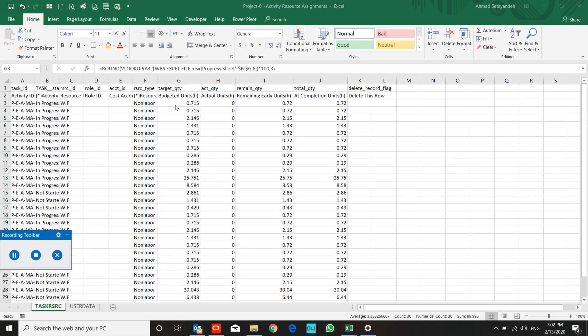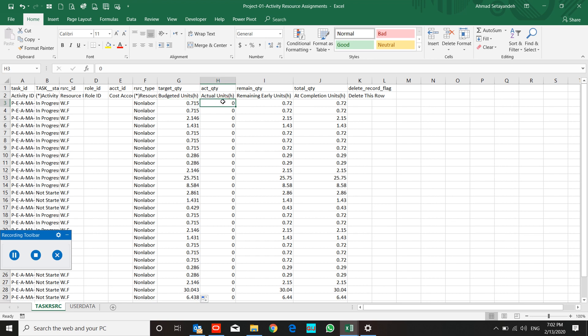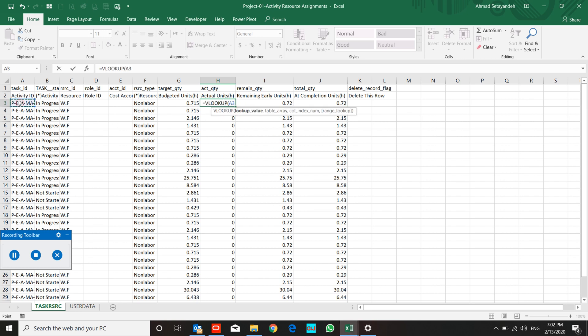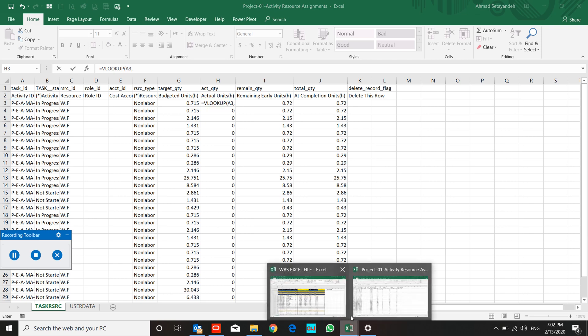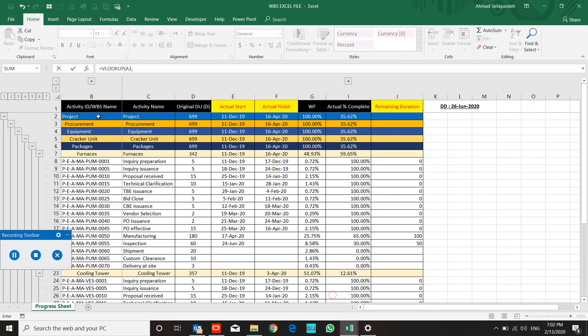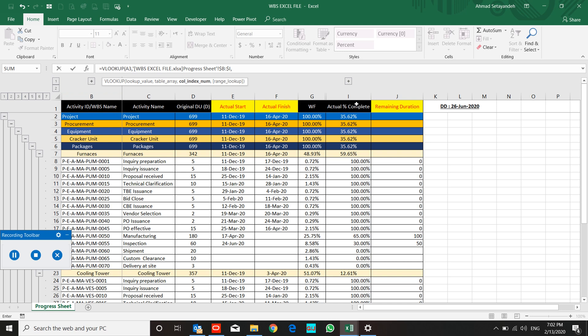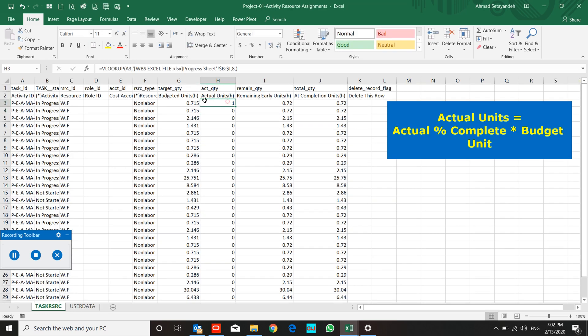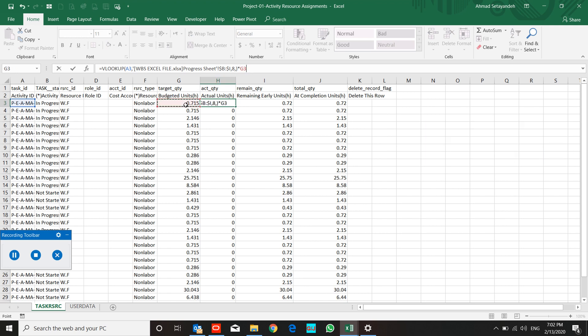I mean two decimal digits. For actual unit, I look for actual unit with vlookup from our activity ID to our progress sheet from actual percent complete, and I multiply it to budget unit.